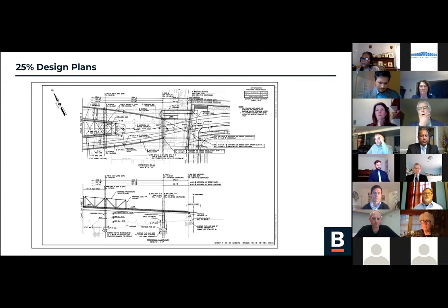Here's the second half of this plan and elevation view on the right-hand side, or the eastern side. Similarly, the abutment here on the right side is being reconstructed along the seawall. There's a new pier adjacent to the existing one, just like on the other side, which is on the left-hand side in this picture. And the end span in this area is also to be reconstructed as part of the project.